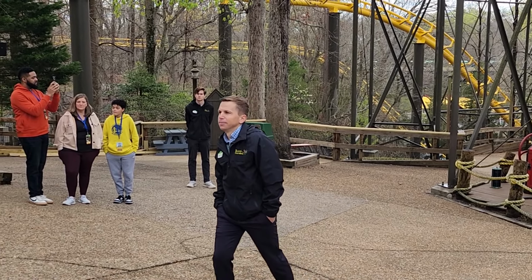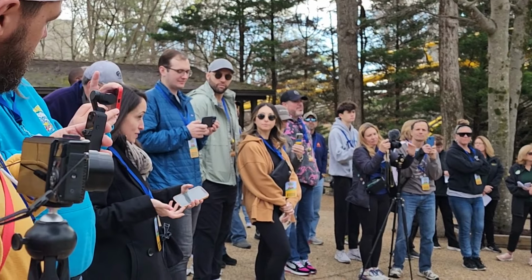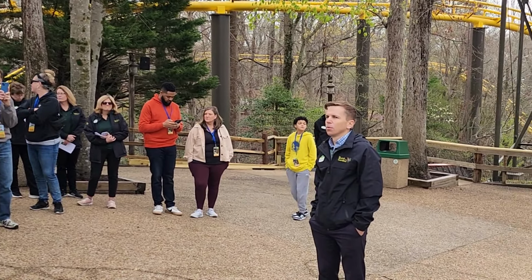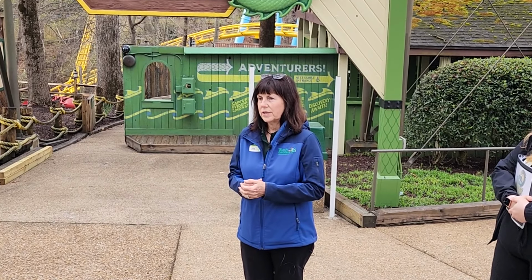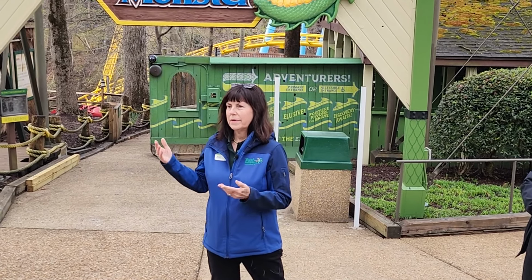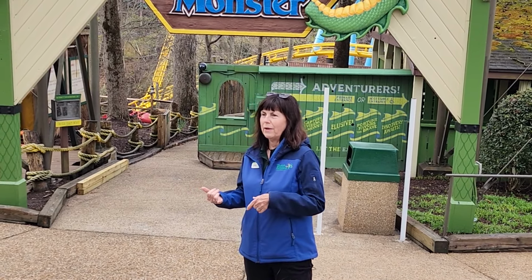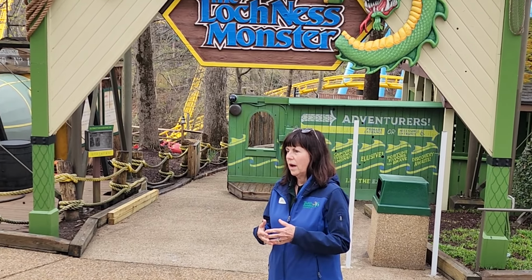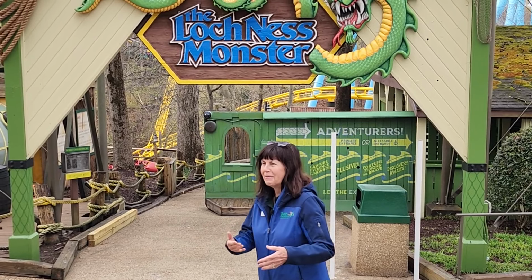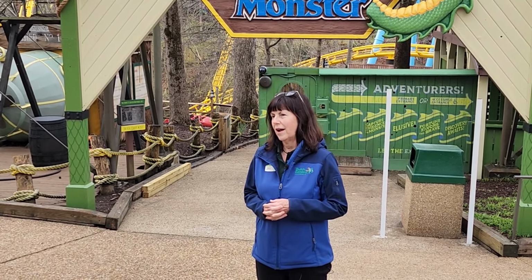From the top of things, design, fabrication, and installation, what percentage would you say of contractors were local to the Tidewater area? Probably 50%, I'd say. We're so fortunate here in Williamsburg. We have a couple of really good general contractors that we bid out to. Certainly we'll bid out work to contractors from, say, Virginia Beach to Richmond. Those are the more successful ones. Obviously, they don't have to pay for per diem and that kind of thing. But the theming contractor that we've used, they're from Orlando, which probably doesn't surprise you, right?